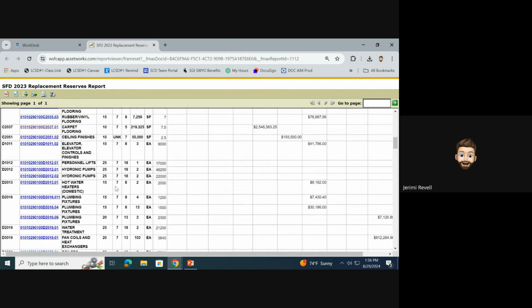One thing I think I should add to this too is when you're looking at those costs and quantities, that's pretty important. In the notes, there may be a written suggested remedy. That doesn't necessarily mean that that has to be the remedy that the district chooses. But keep in mind the dollar value of the deficiency is based on the suggested remedy. And so it's important to take a close look at that, because you might have a handrail in 2 different